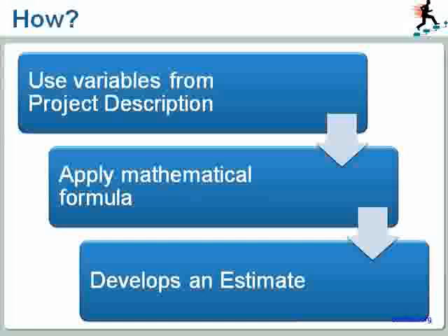That is simple. If you know the number of rails that will be involved and how long it takes to lay one rail, you can estimate the amount of time it takes to lay the 5 kilometers. The formula is also simple. The number of units multiplied by the amount of time each unit takes to create equals the total amount of the effort needed for the development.